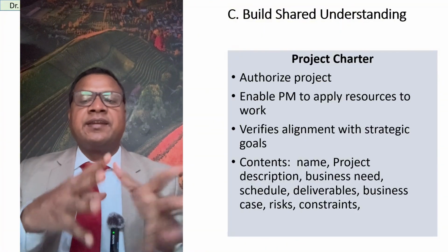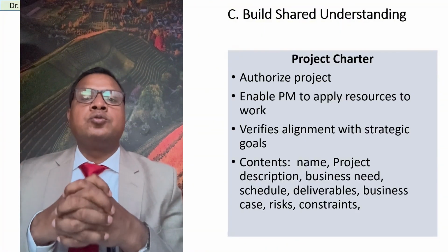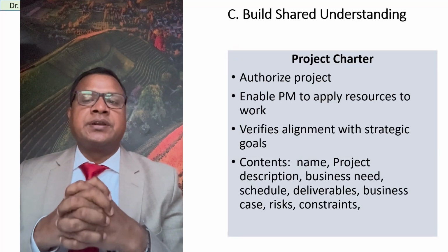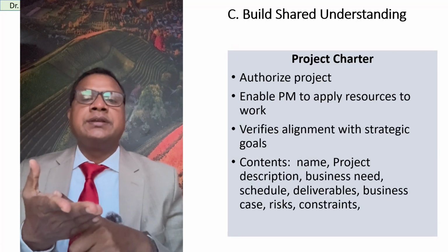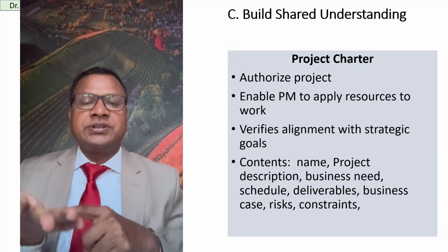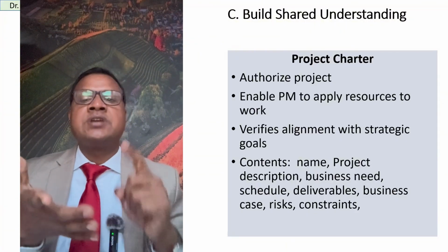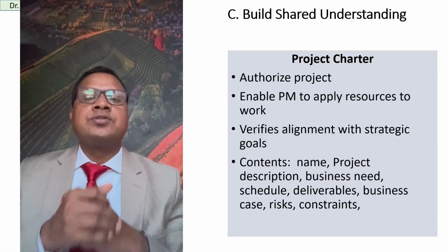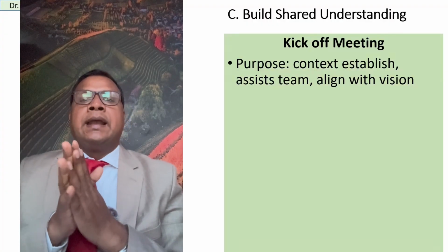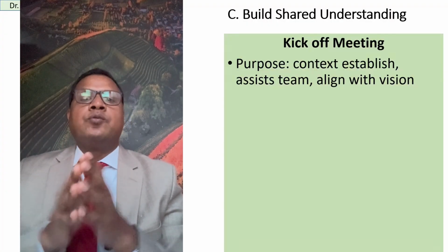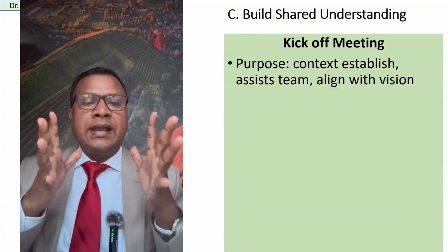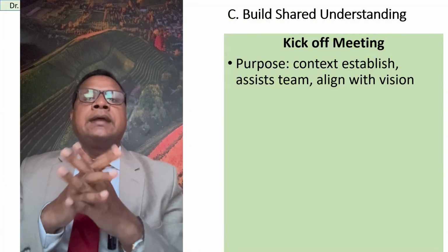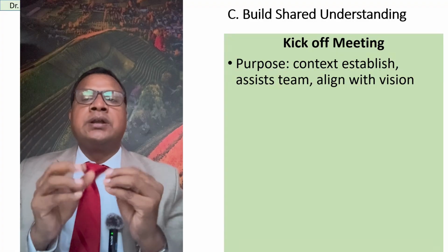The risks and constraints we have to face in this project should also be in the project charter. So the project charter includes the name of the project, project description, deliverables, business case, schedule, risk, and constraints. And now the kickoff meeting. What is a kickoff meeting? When everything is ready to start the project, they do the kickoff meeting.